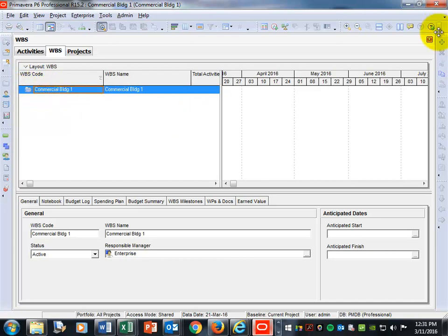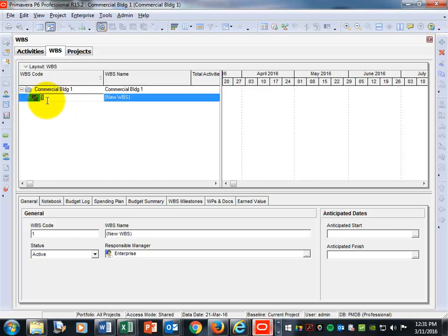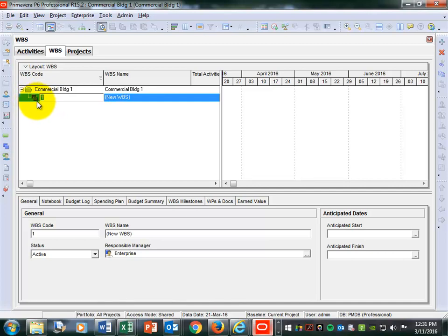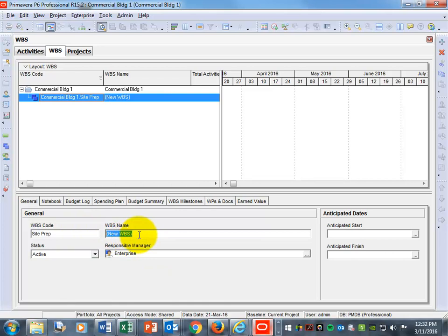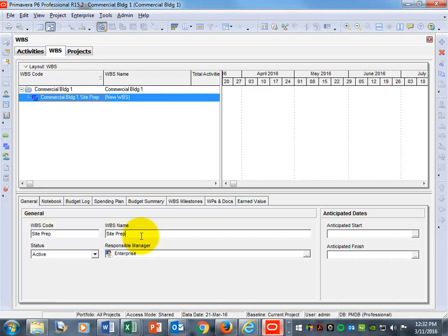Hit the plus sign to create a WBS. A new WBS will have the double blue folder icon. Come down to where it says WBS code — the first one I want to create is called 'Site Prep.' Hit Tab, and the WBS name is also going to be 'Site Prep.'